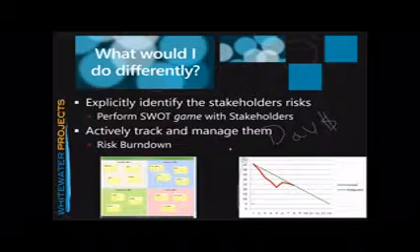Cumulative for all the risks. Yes, Andrea, that is cumulative for all the risks identified. So you'd have, this would be one risk, and then another risk might have 2. Another risk has another 7. Another risk here has 5 more. Another 7 and 8 points of risk, or days of risk if you're using Mike Cohn's approach. We both agreed that the approach that I'm using is good too.